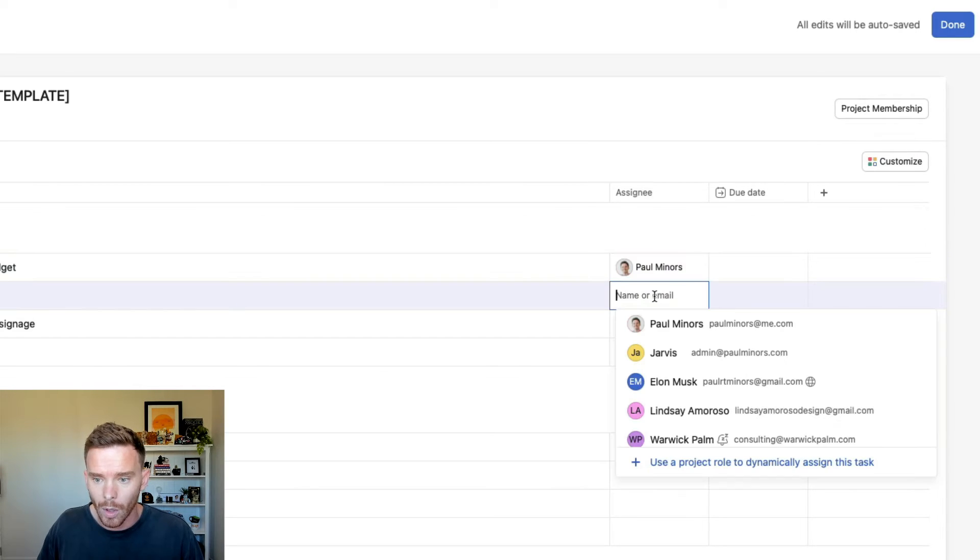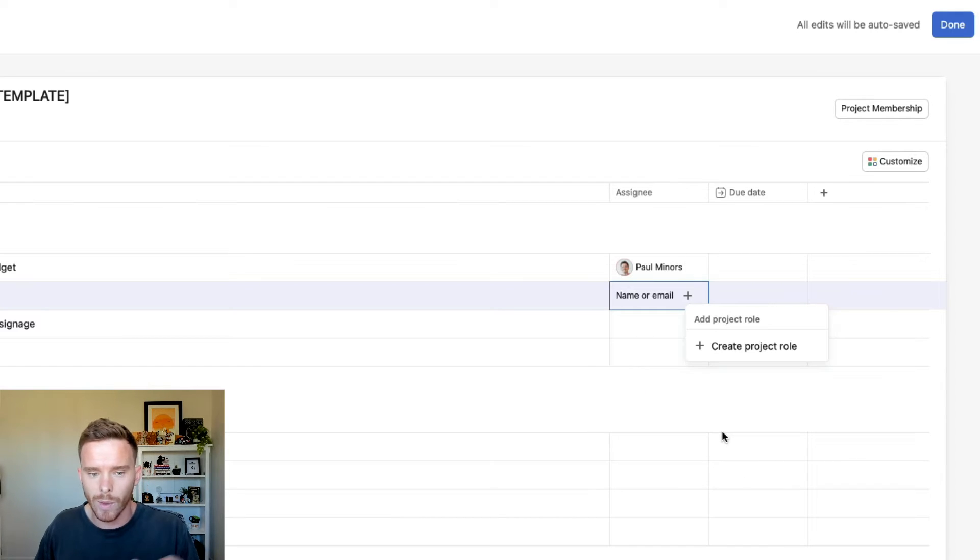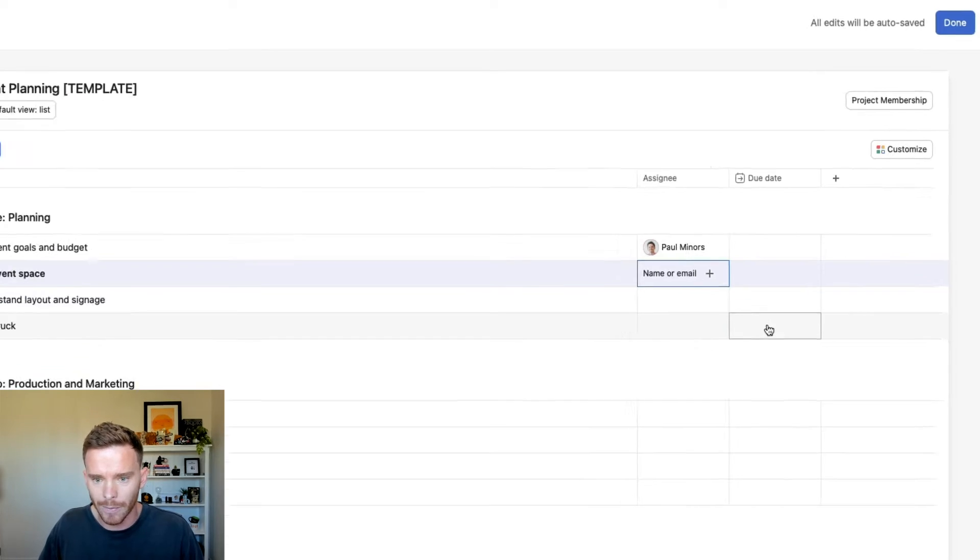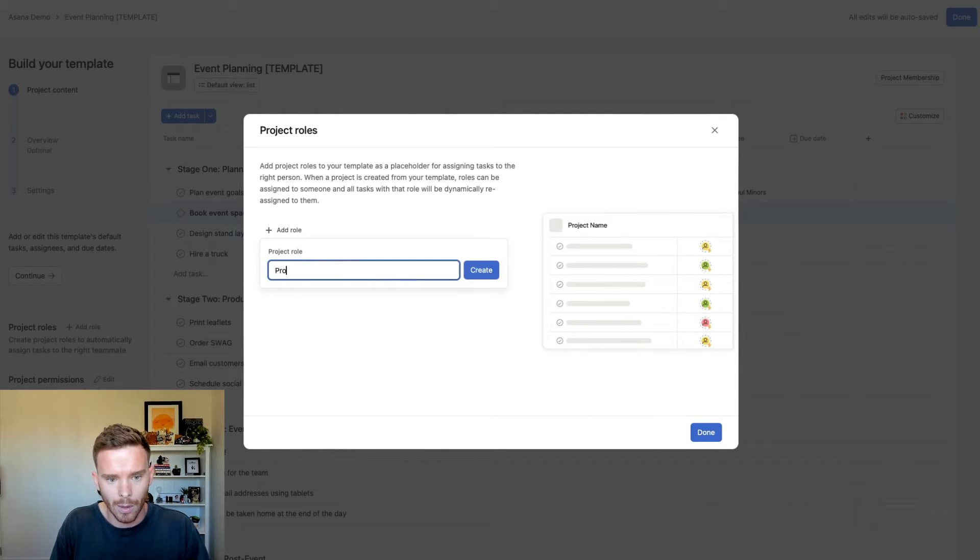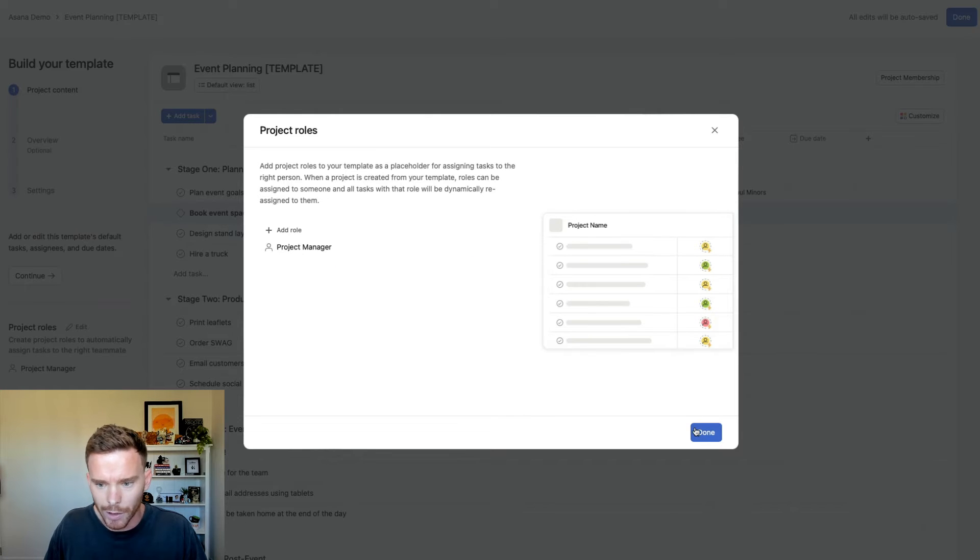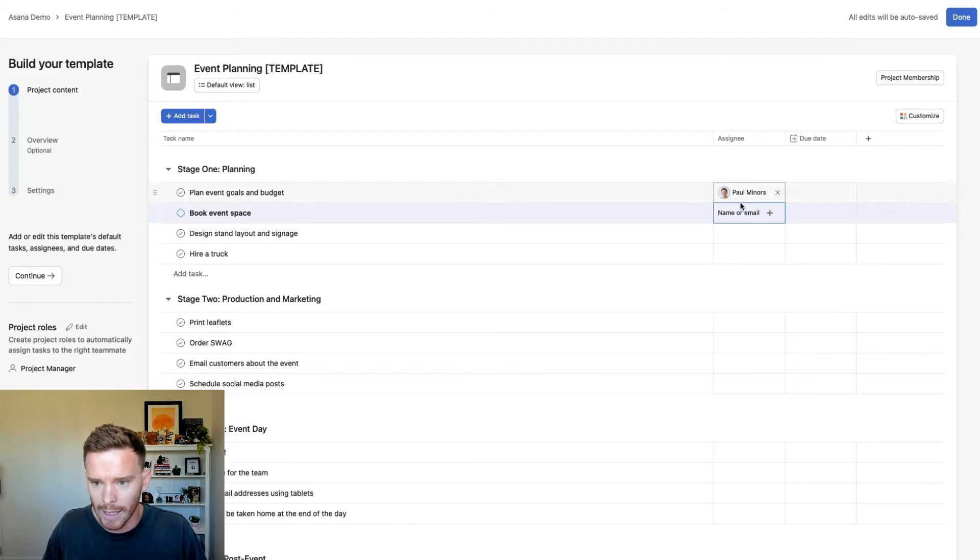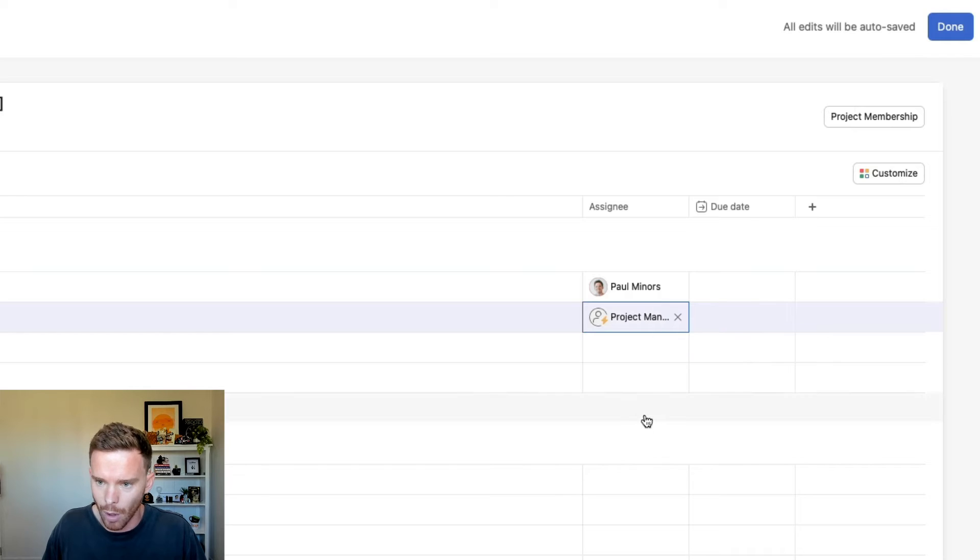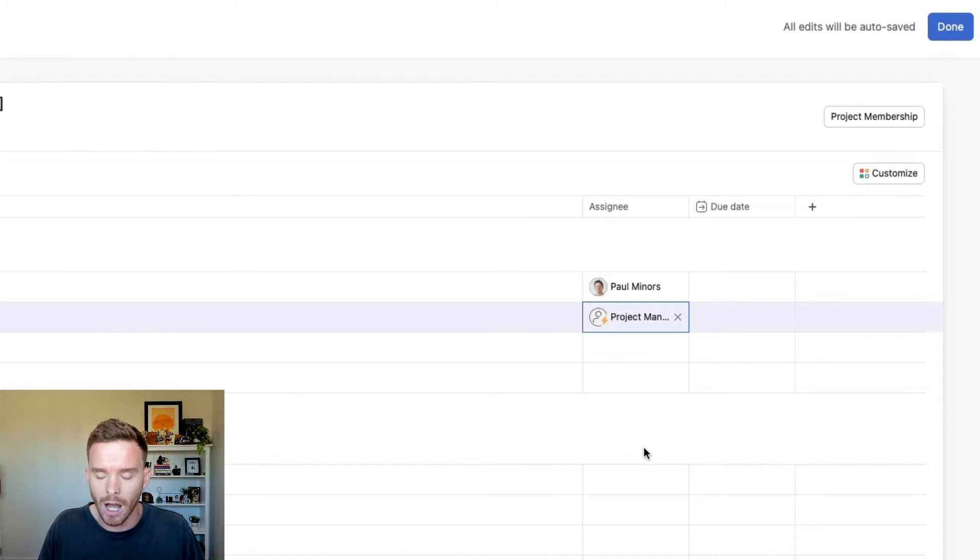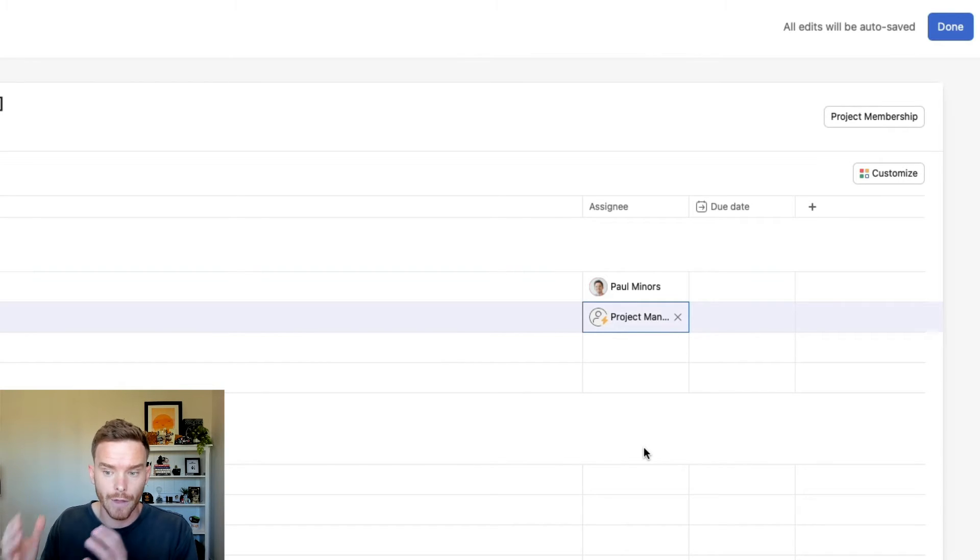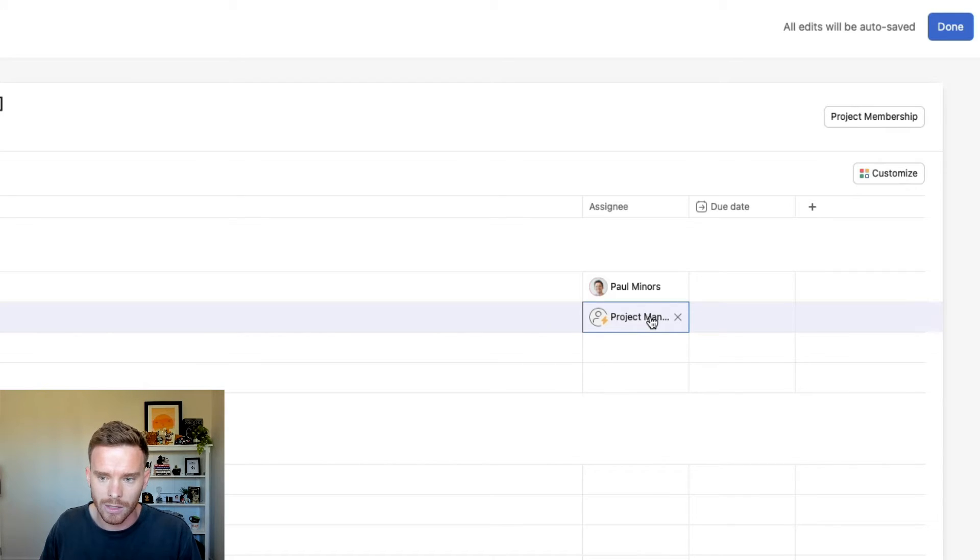And that way, when you use this template to create your actual project, this task here is always going to be assigned to this particular person, so me for example. Or we can also use project roles to dynamically assign tasks to whoever we assign to be that role. So I can create a project role, let's just create a role for project manager. So we've created that role and now I can assign the task to this role. When I use this template to create my live project, I get the option to decide who on my team is going to be the project manager for this particular project, and then all of those project manager tasks will be assigned to that person.